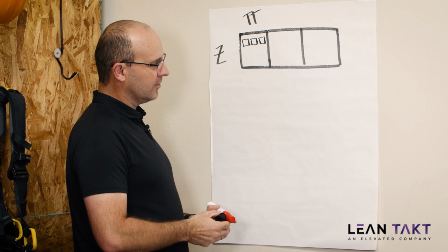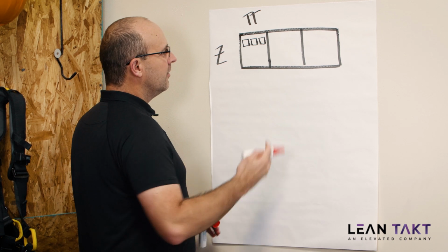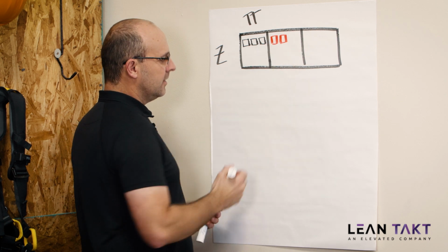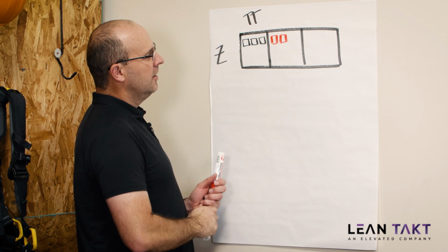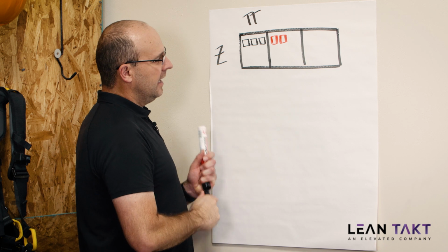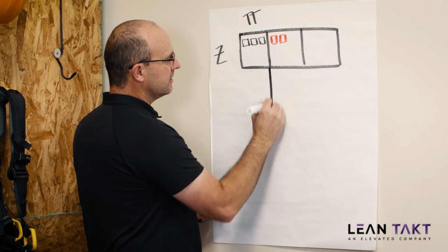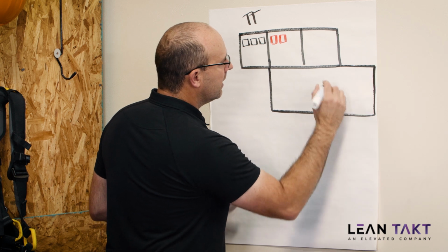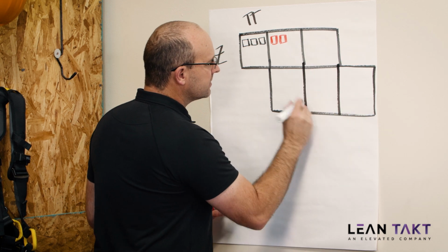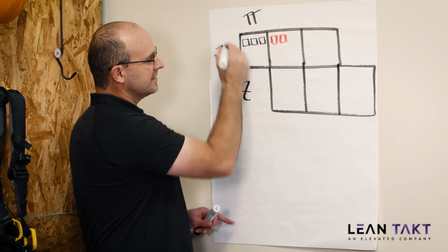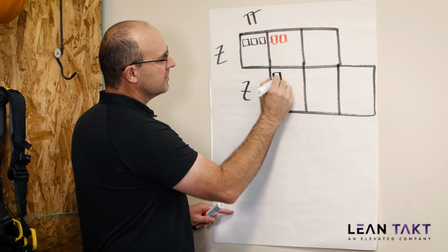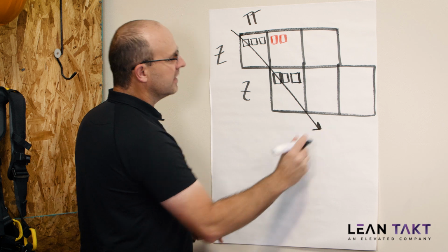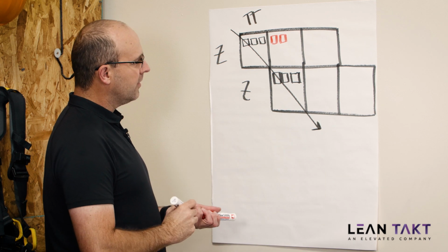Let me go ahead and use red because this is the example. We usually have fire sprinkler, and the problem is that they only have a 2-day duration within each of these wagons. And we always do a stacking comparison, meaning that I don't want to draw on the wall over here, that we will stack it on another zone and see how we flow in the diagonal. So this first trade right here has beautiful, nice flow, okay? But we have a problem over here.